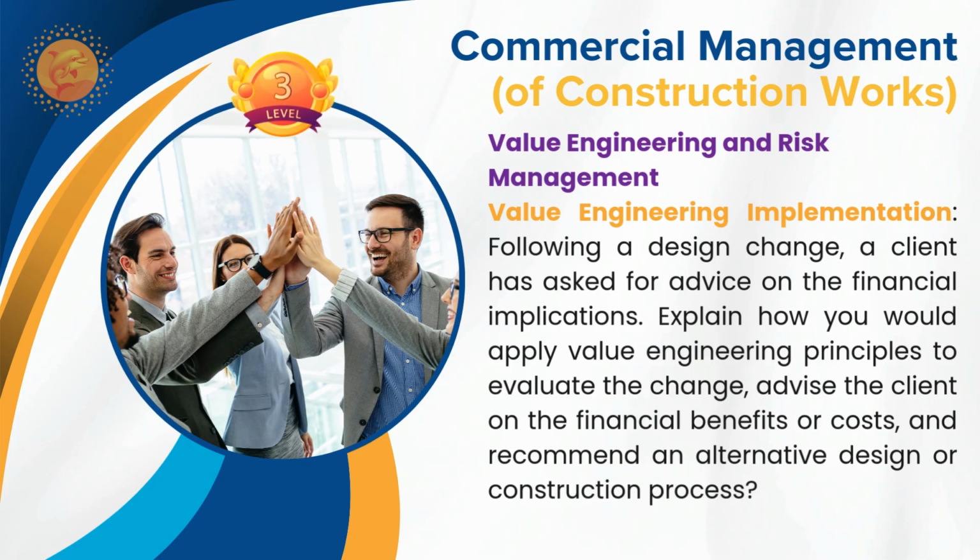So here again, this is a change. So design change. The employer is about to instruct. Before that, he is asking the contractor for the financial implications. So as a contractor's representative, commercial manager, you have to conduct a value engineering workshop to evaluate the change and identify any alternative design solutions or process solutions, construction method solutions available to you that can be proposed from your end to address the change and minimize the impact.